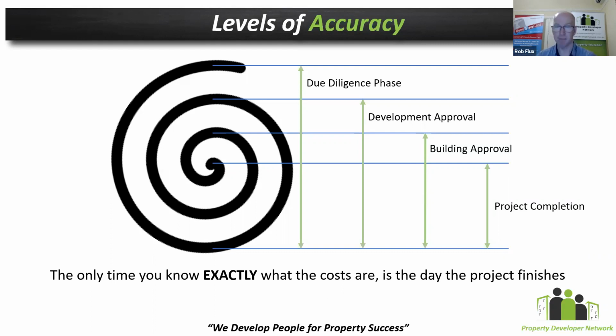I have a methodology that I call the Rapid Elimination method, where I have some high level tasks that I do in my process that try to work out, initially in that due diligence phase, I guess the early stages of that, whether or not I'm even in the right order of magnitude of profitable. So I'm not going to put any more effort in unless it's even in the ballpark of being profitable.